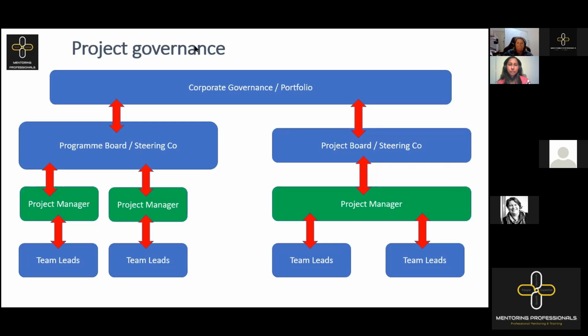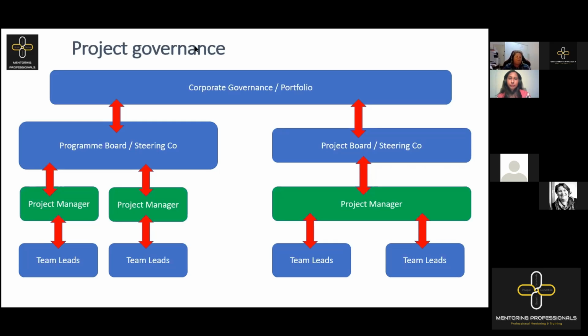Reports is another good one. So Nikki, great one. Those reports that you actually write, not just the exception reports, but those weekly reports or those monthly reports, they are actual project controls as well. Anybody else got anything they want to add to that one? You touched on it with the PID. There'd be the actual changes, change requests and... So the change request itself is not actually a control, but the way of working is in fact a control point. It enables us to control changes to scope.